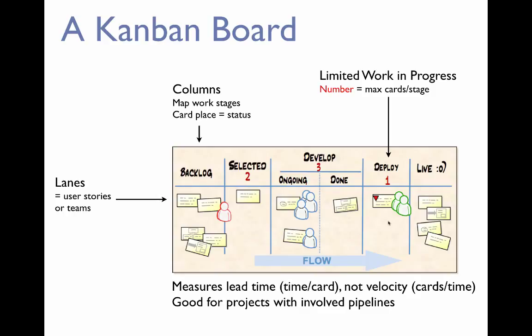but it has a maximum number of items that can be in a given status. So you can say here, right, this is what the red numbers say. The red number says there can be a maximum of 3 things in development at one and the same time. This ensures that not too many things are started, people start to lose focus or overview over what they're doing, and that if something unexpected happens, like, right, the done starts to pile up here, lots of done cards, and somebody wants to move something from ongoing into done, but there are already 3 cards here, and the maximum here is 3, then the whole team basically figures out what the reason for the bottleneck is, and everybody tries to work on the bottleneck so that you have a nice throughput, that you have a nice average time per card that goes through.